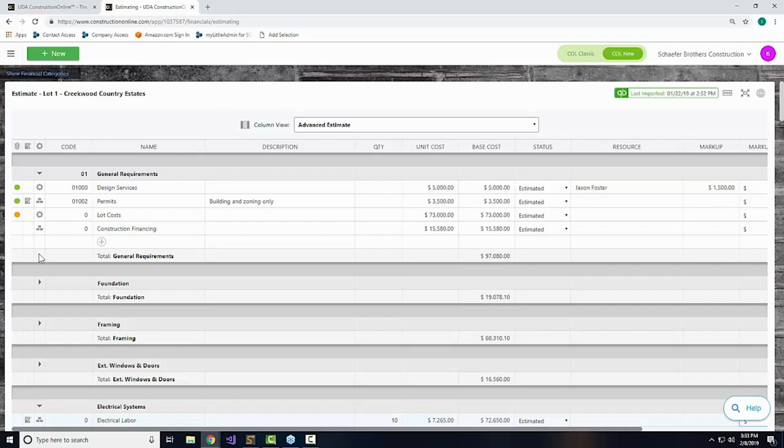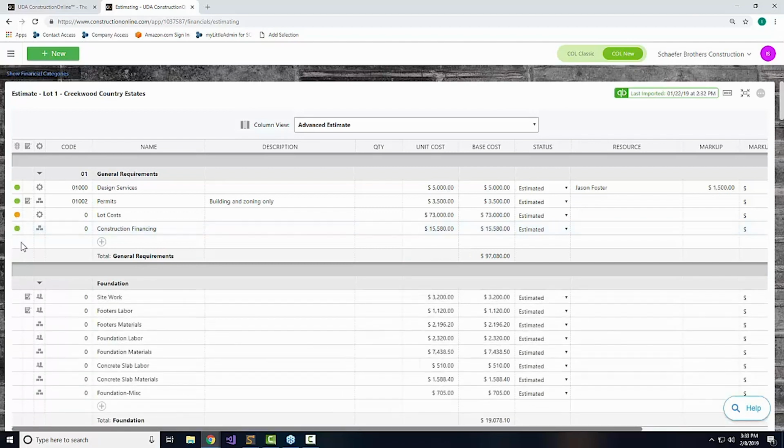It's been extremely impactful for some of the people who have early access to the ConstructionOnline Estimating, and hopefully for you guys as well. This, for me, has been an excellent way to go through and figure out if I've firmed up the pricing in these areas. If I'm confident with it, we can flag or change the stoplight color to represent, green means go. Areas where I have some concerns about the prices, we might flag as yellow or red perhaps if I know that all the bids are coming in over budget.